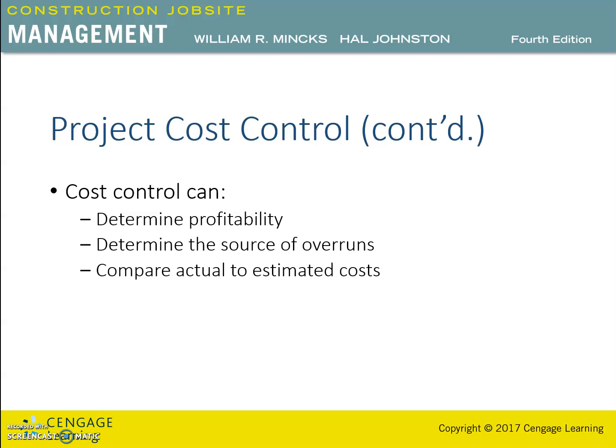The actual cost to the estimated cost comparison for that activity, and this type of analysis can do the following. For example, determine the crew productivity levels, identify the productivity problems. Several productivity problems or solutions are listed later on, and then specify ways to solve problems during the process and therefore limit or eliminate potential losses.